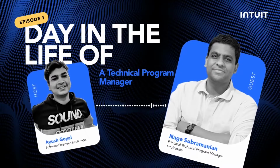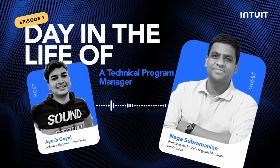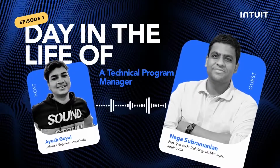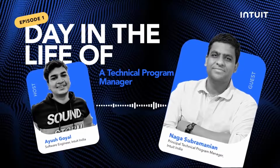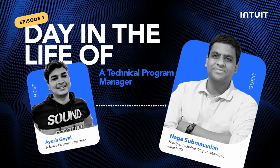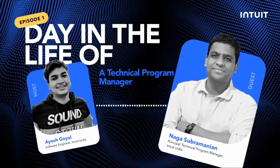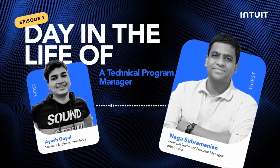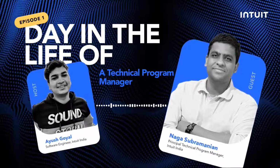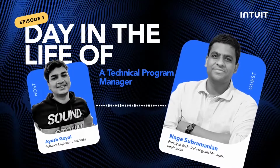Another important thing is that relationships are very important. You can't just randomly go to a person and expect them to accommodate your request, right? That is where it's very important to continuously have engaging conversations with them. For example, in the beginning of a year or the beginning of a quarter, talk to them, understand what their priorities are, and give them enough notice. That is very important. If everything is a last-minute request, again, it loses importance. So for example, let's say you need something from somebody in October. Can you give a heads up in August itself, saying, hey, guess what, I want you to do this only in October. Is it possible? First of all, some dip testing.